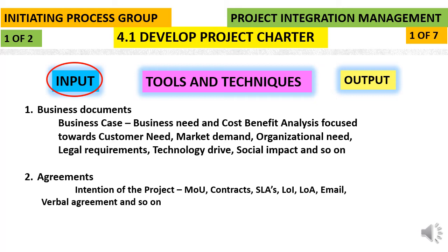The second input for the preparation of the project charter is agreements. Agreements are basically the initial intention for the project. So it could be in the form of a contract, it could be MOUs, memorandum of understanding, or SLAs, service level agreements, or letters of intent, LOI, or letters of agreement, or email, or any verbal communication, and so on and so forth. So these agreements should be in place before we document the project charter.